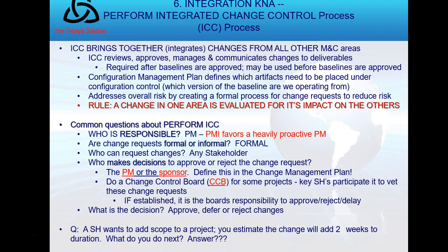I also want to mention that before baselines are built, changes are not required, right, until you have a baseline. But once I have my formal baseline approved, and it's part of the project plan, now I have to go through ICC, Integrated Change Control, to change that baseline. Okay.